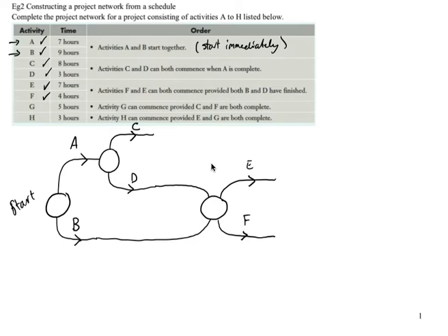If I draw my circle over here, then F has to go backwards, and it looks very unusual. So make sure to draw the circle to the right of your rightmost arc. So in this case, I could draw it maybe here. Now, out of C and F come G.